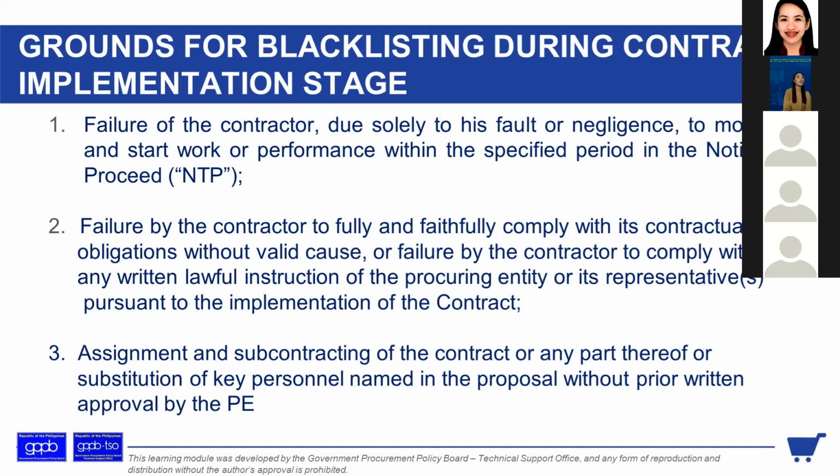So, another would be assignment or subcontracting of the contractor, or any part thereof, or substitution of key personnel named in the proposal without prior written notice of the PE. So, ito, di ba sa infra, nagsasubmit sila ng sino ang mga tao, sino ang mga project engineers, sino yung mga safety engineers na involved. Tapos, yan, ganda-ganda ng license dyan, mga experience. Tapos, during actual, walang prior written approval by the PE kung may mga pinalitan sila.